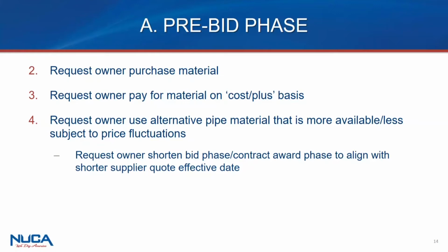Okay. Tom, this is Bob. Send me the two memos. I'll put them up on NUCA.com. Okay, I'll do that. Just before I move to the next slide, also make sure, just because the owners are willing to purchase the material, make sure he's willing to pay for storage as well, if you've got to do that. So think through the issues of where you're going to put that and who's going to protect it and at whose cost. Next slide, Tom.